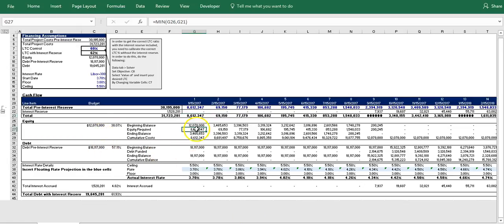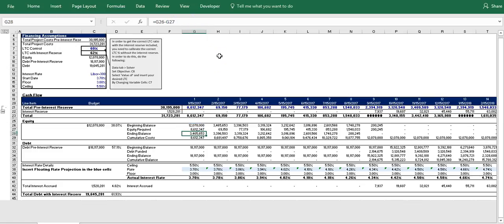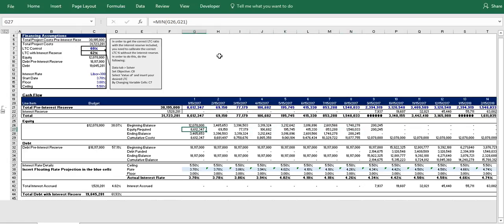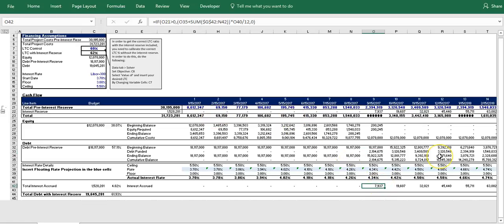And so underneath that we have our equity draw and our debt draw, which to keep belaboring the point, they are drawn on the total pre-interest reserve construction cost schedule in order to create the interest reserve again in the first place. And so as we can see, our equity is drawn down first until it's completely exhausted, and then once it's completely out, our debt picks up and subsequently that is when we start to accrue our interest.